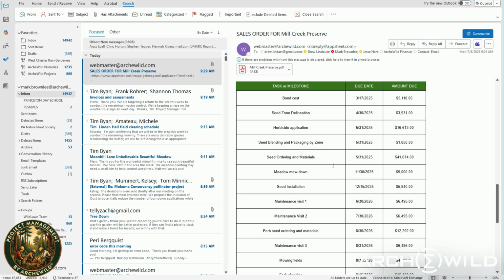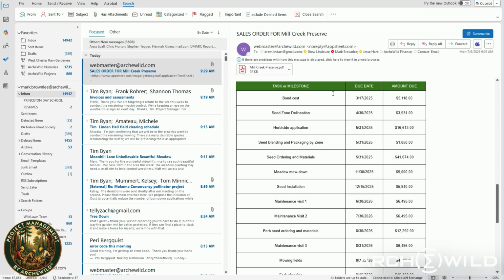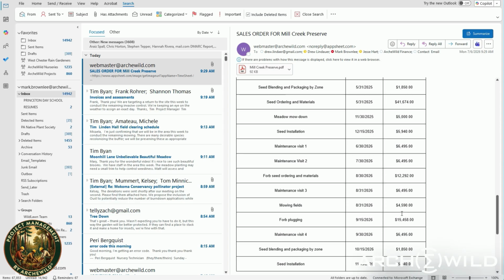And townships and government agencies, they just love this. They want to know what the project plan is, so they interpret this as a project plan, and it largely is. And a date when that thing will be done and what it's worth. So they can use this panel right here for crafting their own project plans. They can send this table to their accounting department to give them a heads up that approximately on those dates they will need to have these amounts in their bank account.